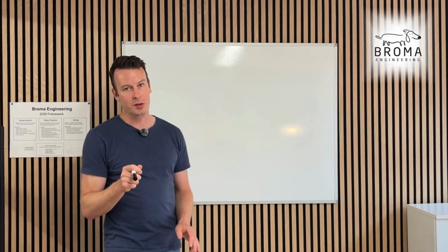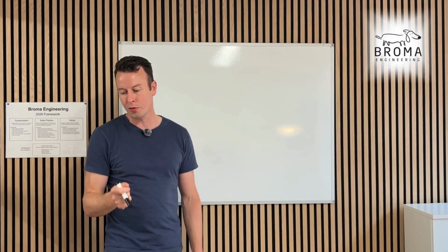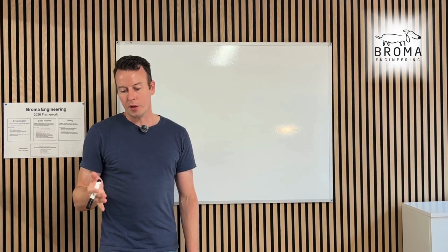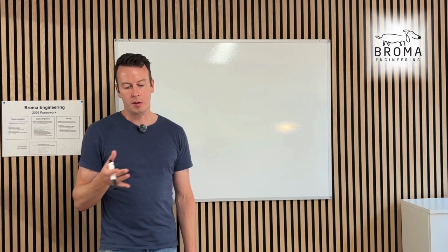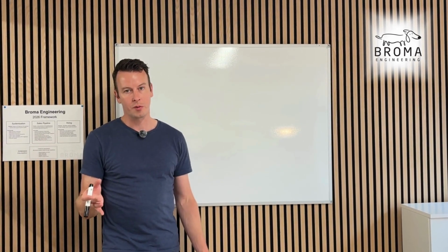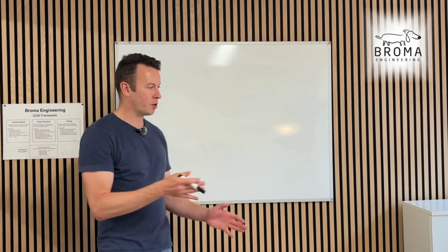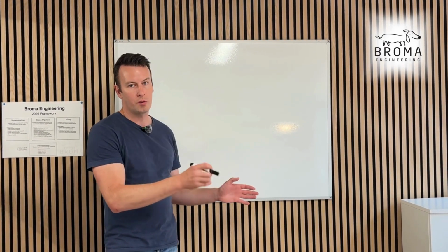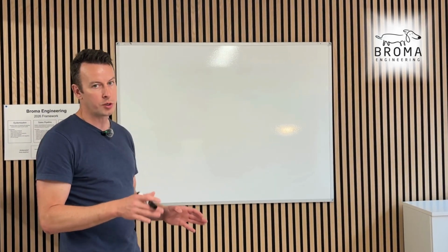Red tag needs to go on easy. We need it to prove that quality is up to date. It's not kitchen sink kind of a tag. We're not throwing everything in there. We're not finished. We're far from finished. We've just got the equipment from the factory and set it in place. We're not checking everything. We're just checking what needs to be checked.